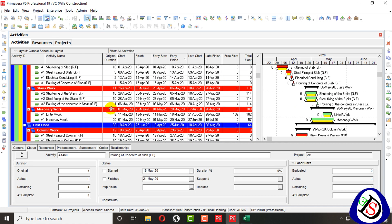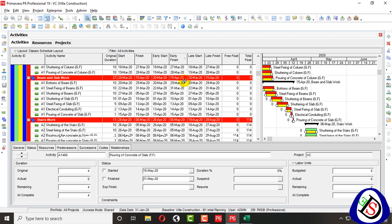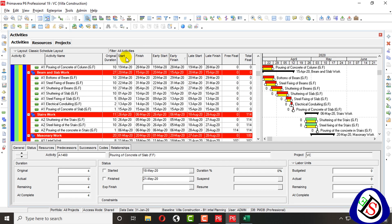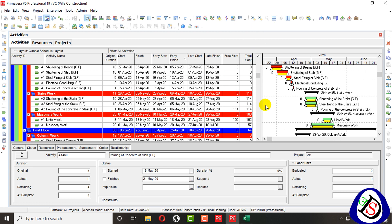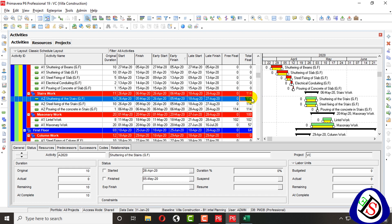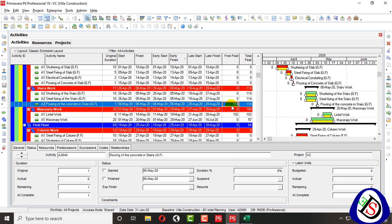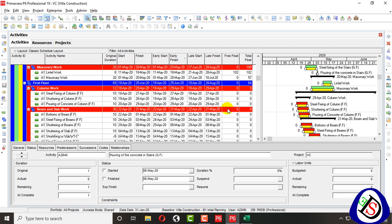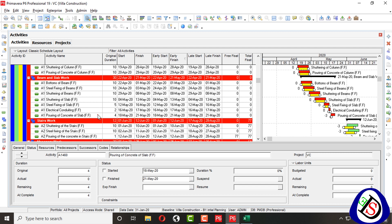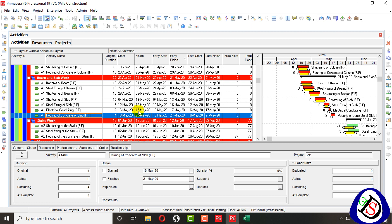Here I find an activity on which we can practice constraints. You can see the columns: Start and Finish — these are our scheduled dates. The next ones are Early Start, Early Finish, Late Start, Late Finish, Free Float, and Total Float. Here the Total Float is 114, meaning this activity can be delayed 114 days without disturbing the project. Free Float 114 means the successor and predecessor are maintained for 114 days.